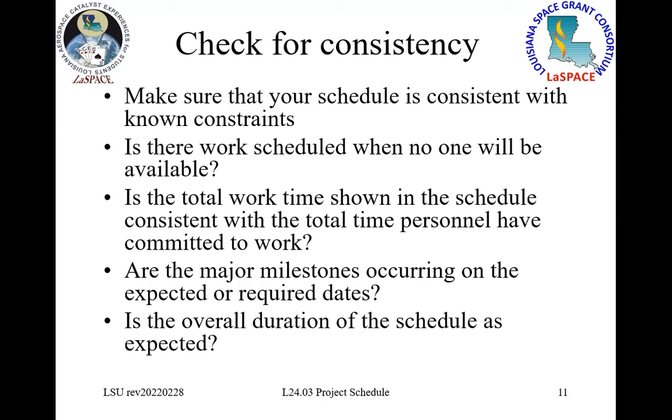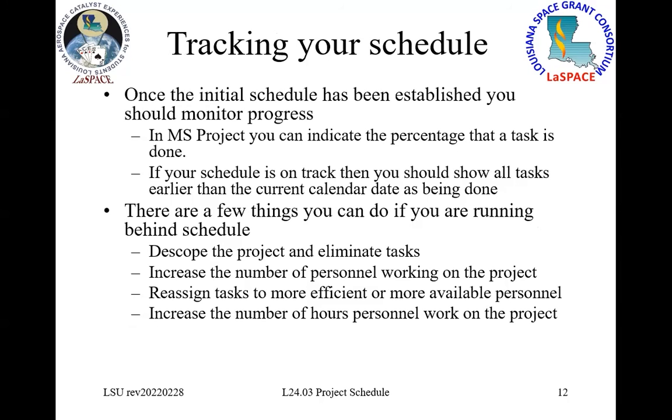If you do the scheduling and your WBS and you end up calculating that your payload is not going to be ready until August, that's a problem, right? So you've got to check for this consistency.